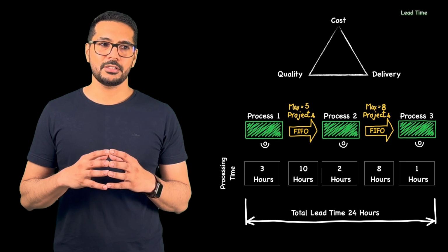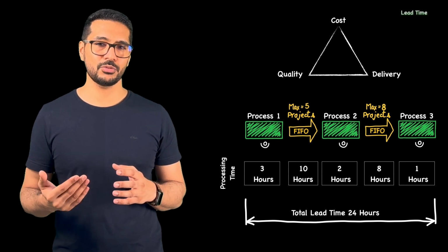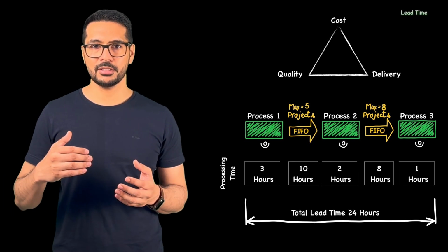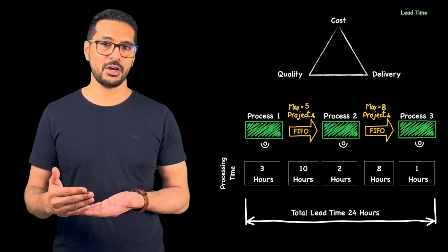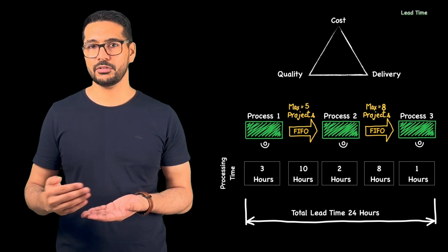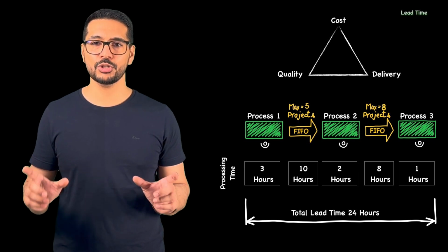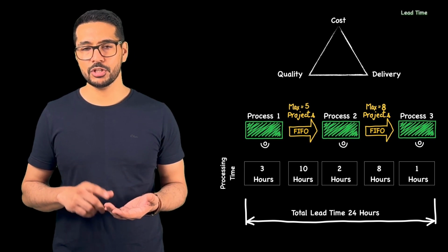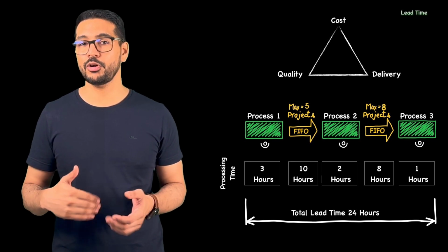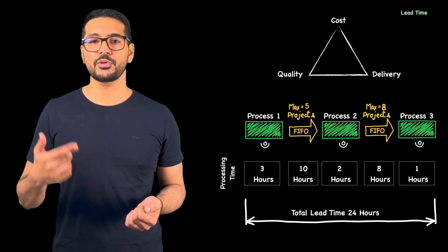So in case we see that our total lead time for the product or the services we are delivering in a particular service area or office is drastically increasing beyond 24 hours, maybe the last projects were delivered after 30 hours or 40 hours, 50 hours, we know that as per our defined system that should never exceed 24 hours. So something has gone wrong, so it could be identified, it could be analyzed, and the corrective action could be taken to improve, and so the process will improve next time.